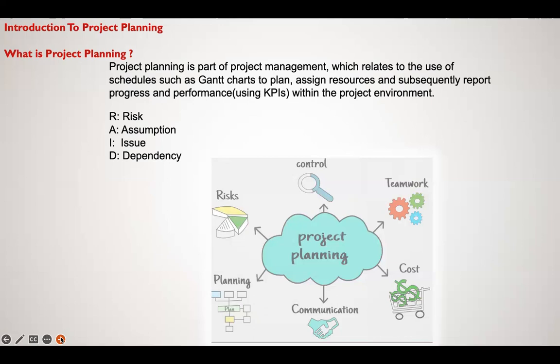So you need resources. And the resource can be human, which is called labor, can be non-human, which is non-labor, like equipment, machineries, and it could be what's called material or consumables, what you consume at once. You can't consume that again. But the labor and the non-labor are reusable, but the other one is not reusable. So all these things, you'll be thinking about that.